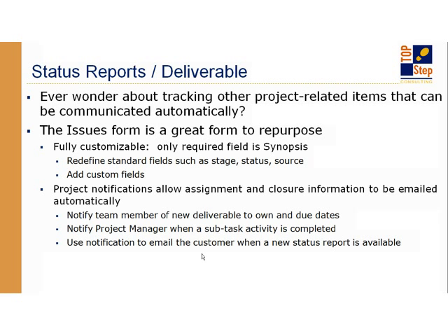I've worked with customers to set it up so that they're actually using it as a deliverable, like, tell me how you're doing on this deliverable, or breaking those high-level tasks on the project plan down into individual activities and saying, okay, you're working on the implementation task. I'm going to make your timesheet easy. I'm going to have you only record time to the implementation task. But your job within implementation is to set up the sandbox, to load up the test data, and to write up the configuration document. Okay? But I don't want you to record your time down to that detailed task level.